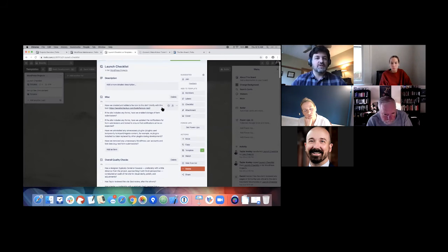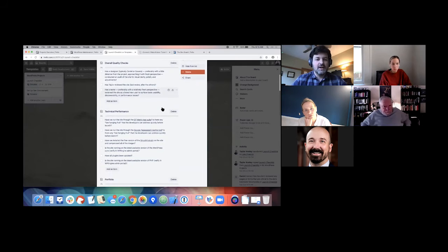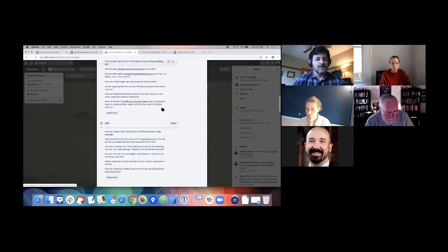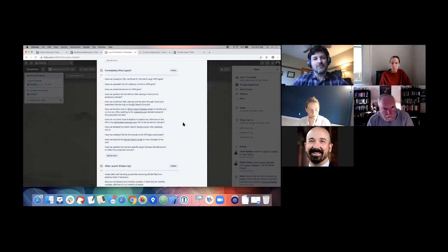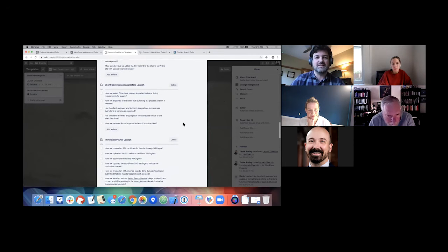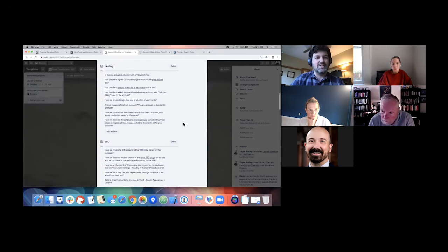And so what we've set up over time is this pretty extensive checklist of all the things that have to happen before we can launch, and then all the things that have to happen right after we launch, right? So basically every time we run into any kind of issue, we used to call them post-mortem meetings, and now we call them postpartum meetings because it felt a little more hopeful. But we try to talk, right after a site launch, about what went wrong and what went right, and what we need to improve on next time, consistent with that Kanban philosophy. And when something went wrong and we're like, oh yeah, we should have checked this, or we forgot to do this piece and had to fix it right after launch, we try to add that to the checklist for next time.